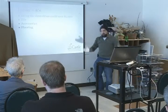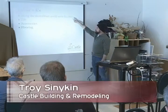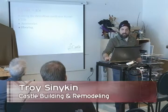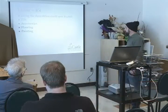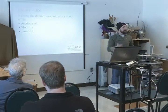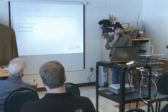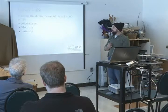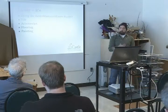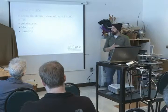So as we get to our budgeting phase and we're looking at trying to meet a budget for a client, they can do some demo. A lot of them will do painting. That's probably one that hasn't come up yet. Professional painting is expensive, quite expensive. A lot of the times it's worth it. We have had those projects where my designers get done with it, the homeowner painted it, and the designer goes to see how everything looks and they shed a little tear because it just wasn't handled too well. It certainly is something that a lot of people, if they take the time, if they prep right, and prepping is really what painting is all about, can save quite a bit of money.